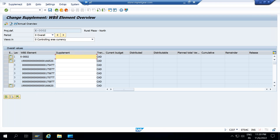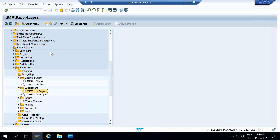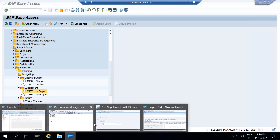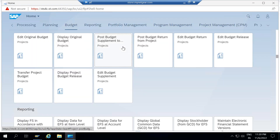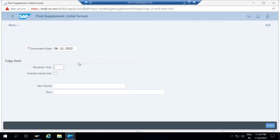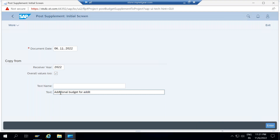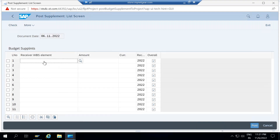Coming to the SAP Fiori side, what different apps do we have here? There is an app called Post Supplement Project. You click here and see the options: document date, receiving year — I'm entering 2022 — and overall values. Press enter. This is a copy of CJ36; we have the option to enter receiver WBS elements for which we are going to supplement the budget.